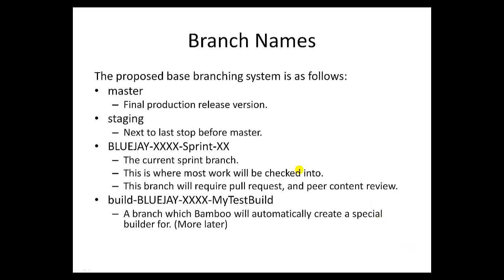Before we go much further, I wanted to speak about the names proposed for the branching system. Master, of course, is the final production release. Staging would be the next-to-last stop before we actually push to Master — it's like a test branch before we go to final production. Each branch name is written out with the JIRA project name (e.g., BlueJ), the JIRA ticket number, and the Sprint number. This is a proposed method, not necessarily how we have to do it, but we're going to try to be consistent as we move forward. This would be the current Sprint branch where most of your work would be checked in, and you would check out this branch and work on it over the Sprint.